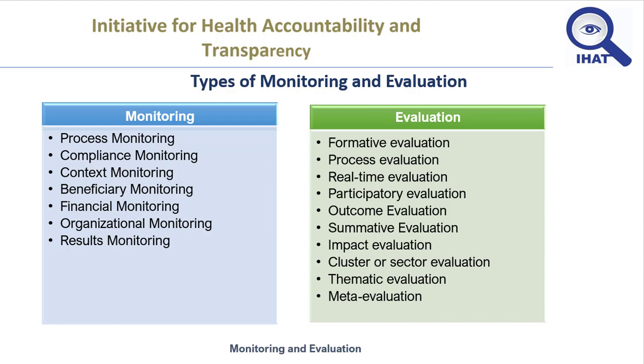There is the summative evaluation. This occurs immediately after project conclusion to assess project efficacy and the instant changes manifested by its intervention. Summative evaluation compares the actual outcome data with baseline data to determine whether the project was successful in producing the intended outcomes or bringing about the intended benefits to the target population. It provides evidence of project success or failure to the stakeholders and donors to help them determine whether it makes sense to invest more time and money for project intervention.